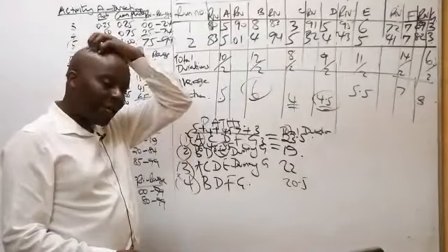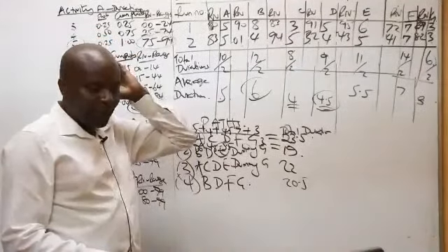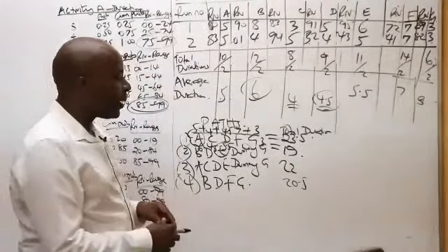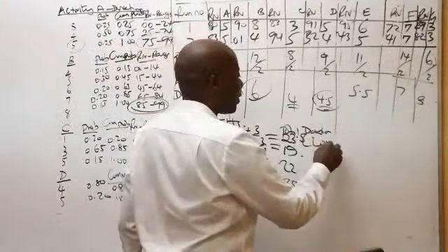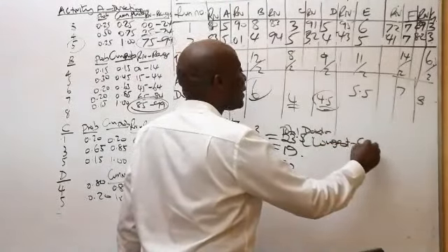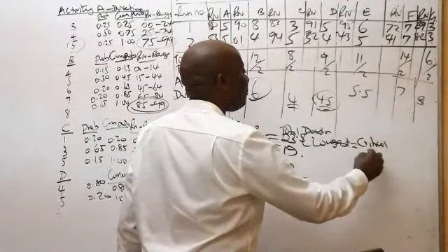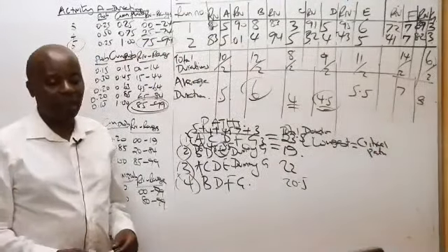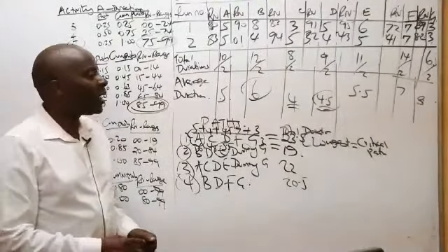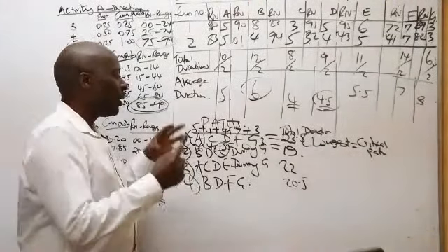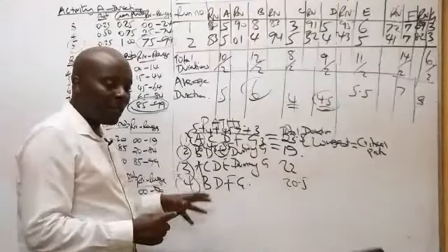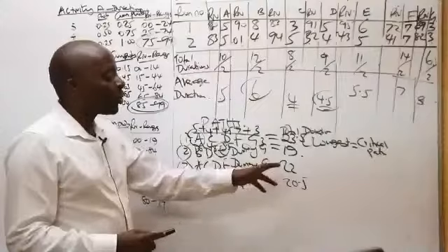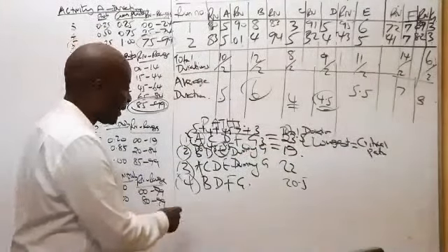Which one is the longest path? It is still path number 1. So path number 1 is still the longest, which means that it is still our critical path. So meaning that even after simulations, path number 1 will remain the CPA, but now after simulation, the simulated project duration will be 23.5.